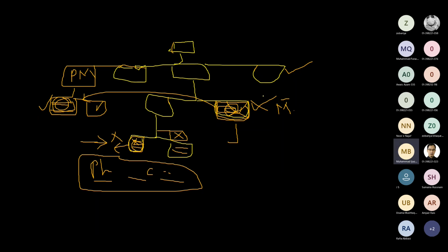On a trip there was transportation, and in this transportation we decided that we will not bring our own cars, rather we will take a bus from somewhere on rent, and we will go on that bus. So in this case, I will not break down this work into checking your fuel, brakes or tires and everything. I'll not break down this work because now I don't have to perform it.